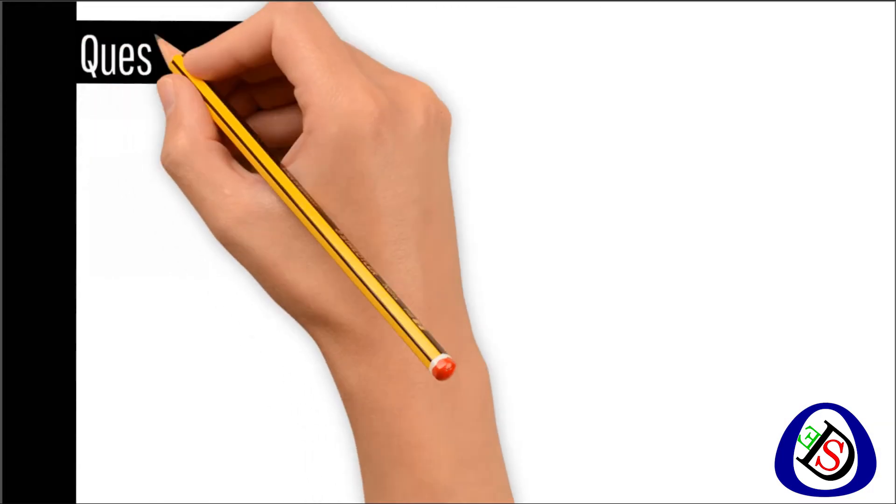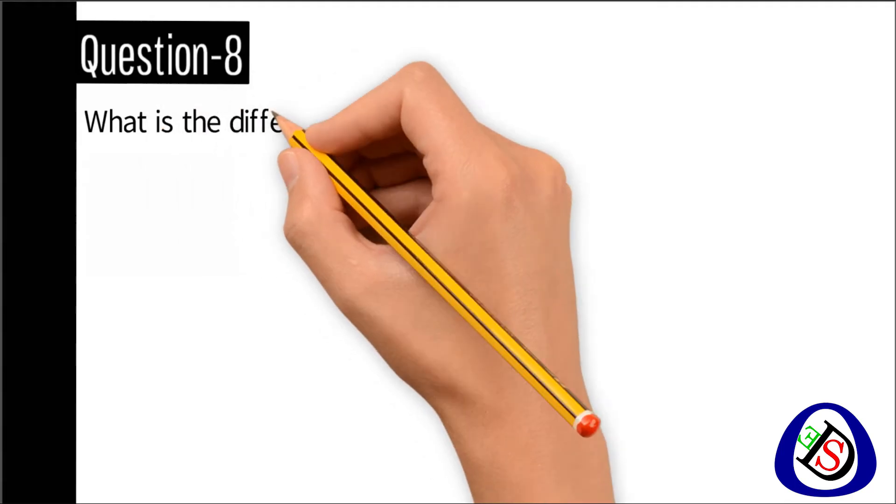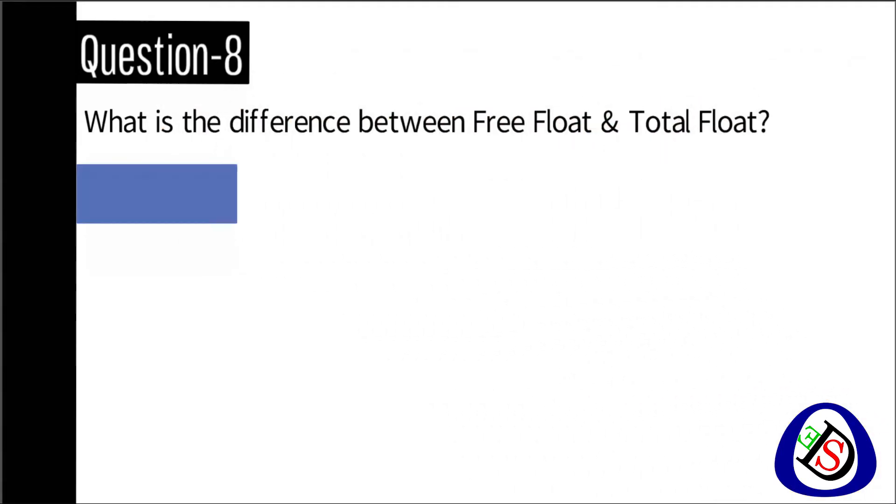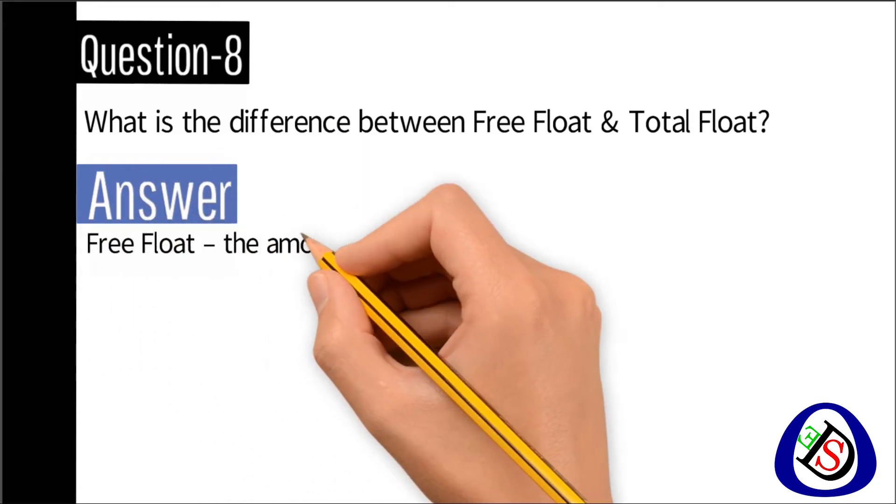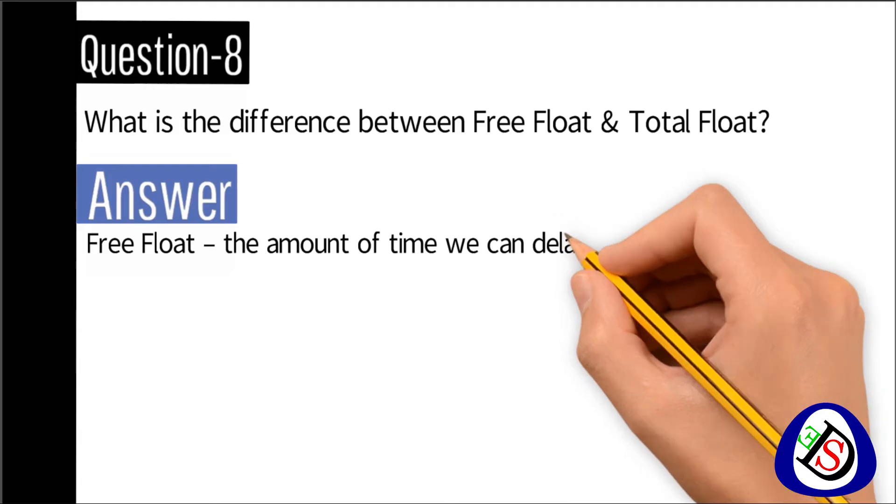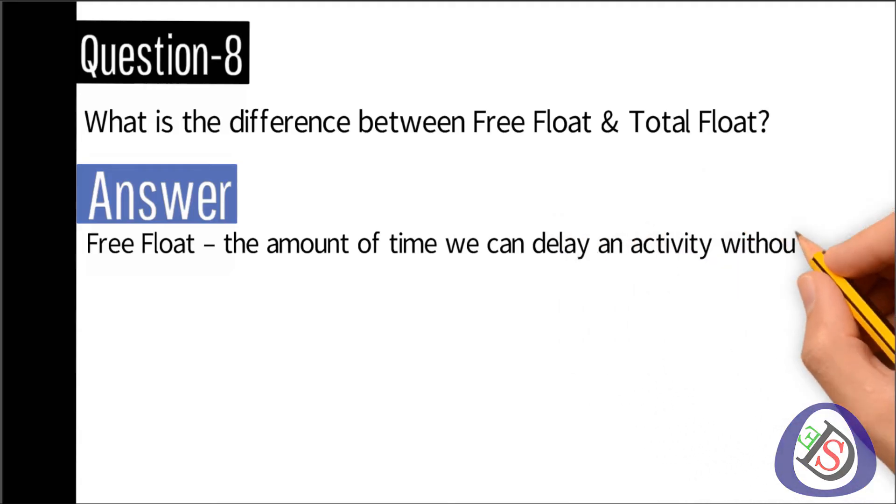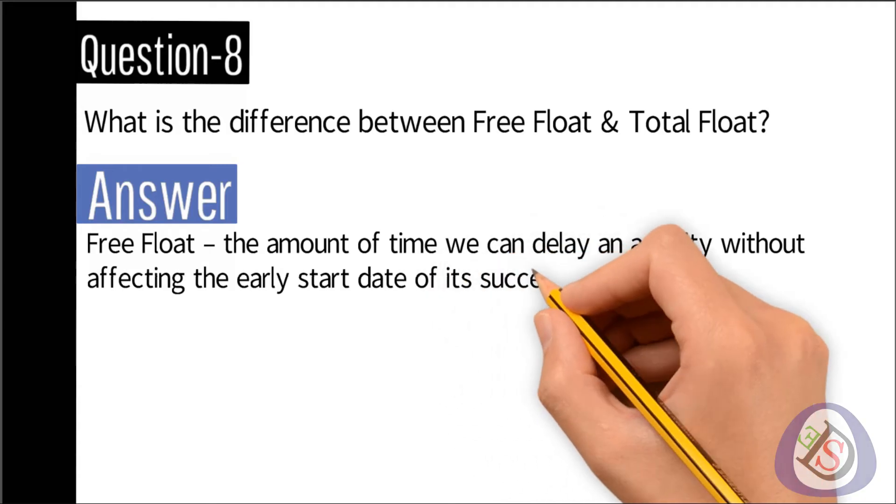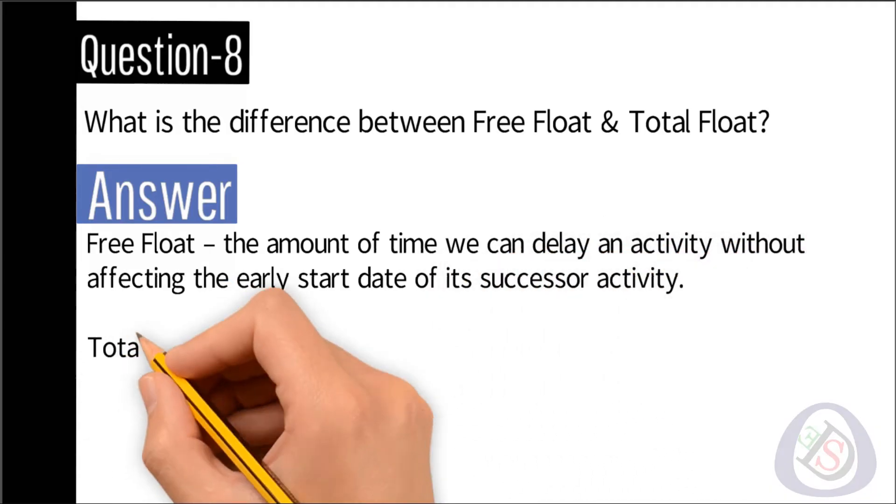Question number eight: What is the difference between free float and total float? Answer: Free float is the amount of time we can delay an activity without affecting the early start date of its successor activity.